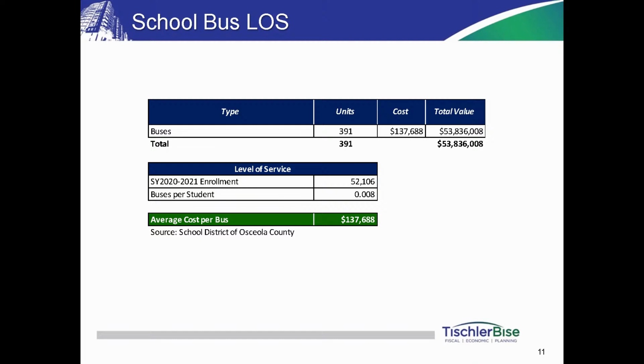All right, I got a question, and this is a dumb question: how did you arrive at 246 based on these numbers? I'm averaging it, it's 283. It's weighted though. 217, 231, 382. I've done it every which way. You got it: 217 plus 232 plus 382 plus 303 divided by 4. Is that average by student stations? He's coming up with 283. No, it's the cost of construction divided by 450, the gross square feet.